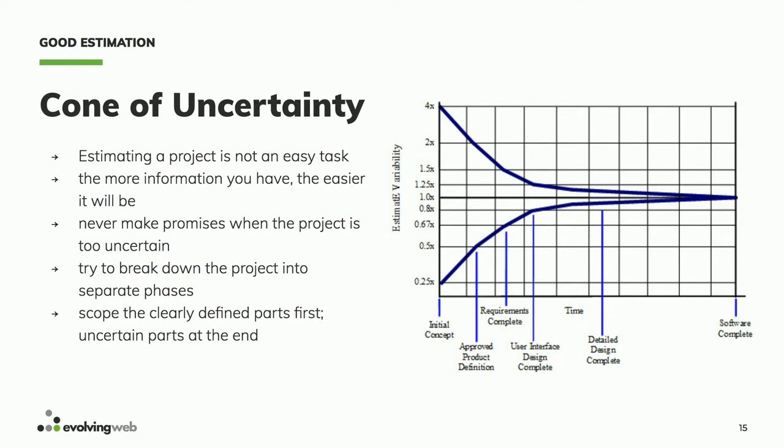So then when you start development, you get visibility in that process. And as development goes on and you're into QA, then it starts tightening down. But at the same time, when you hit QA, the client will come back and say, oh great, now that the site looks like it's done, my boss finally took a look at it, which he never really saw the design despite the fact that he signed off on them, and now we want design changes and all these extra features that we don't have on our existing site. I mean, we're putting it in the RFP, but we can't launch without them.